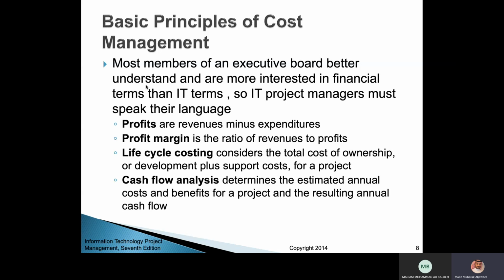We also have the cash flow analysis, and this is very important for the project because, imagine that you have a project that will cost 1 million dinars, and the sponsor will sponsor you for this project. Don't expect that the sponsor will give you the 1 million dinars on day one of the project. It doesn't work like this. There will be a schedule of payments, and it will be decided based on your estimates and the budgets that you are going to create in this process.